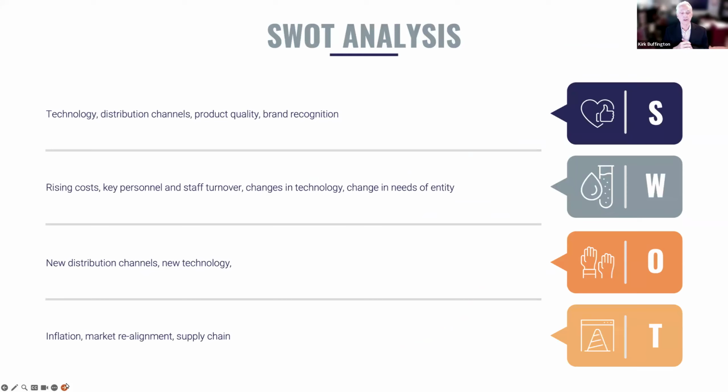We'll talk a lot about SWOT analysis and how important it is to have a SWOT analysis: strengths, weaknesses, opportunities, and threats. And I don't suggest that we should do a SWOT analysis for every single solicitation that we put out to bid, but those that present higher risks, such as high value, high profile, those types of solicitations, there should be a full-blown SWOT analysis done with all the stakeholders to identify every potential risk. And every solicitation that we do has different risks.